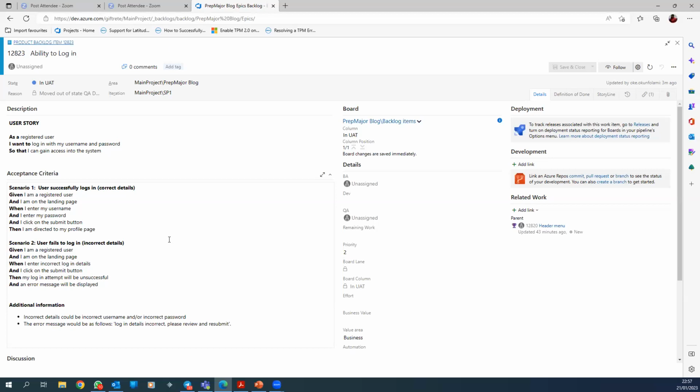Do you get what I mean? Because there are different payment types. So you see how you can easily identify whether it's going to be a feature, an epic, or a story. You might say payment might be a feature. Maybe the epic will be access to course, maybe if it's a course page and you need to pay to access it. And to access the course, maybe registration will be one of the features. Maybe payment will be another feature. Then under payment, we now have payment by Klarna, payment by card, payment by PayPal.